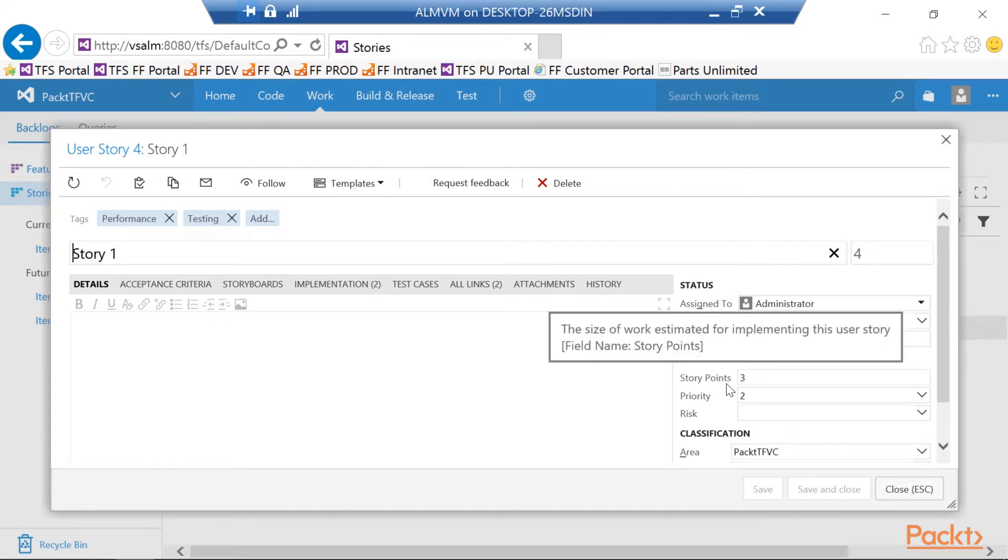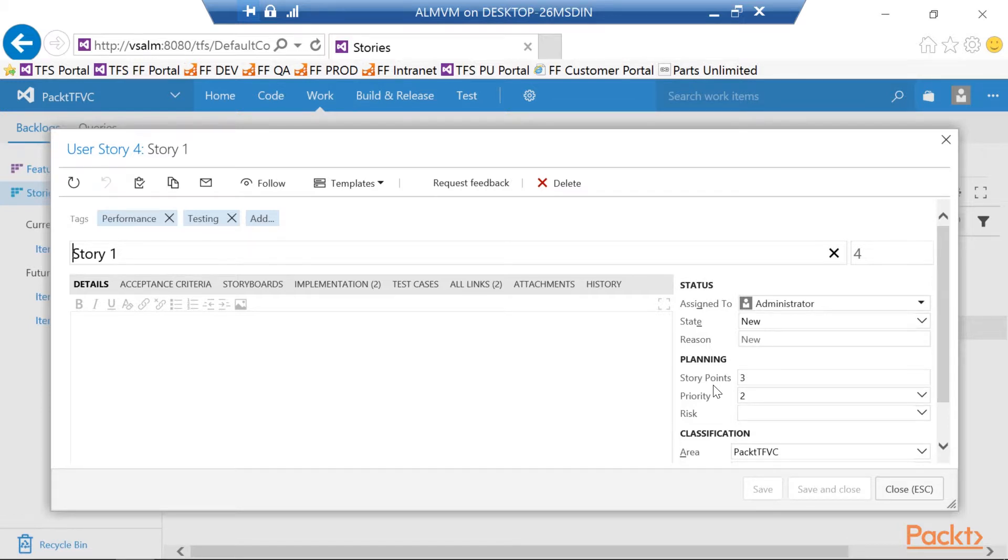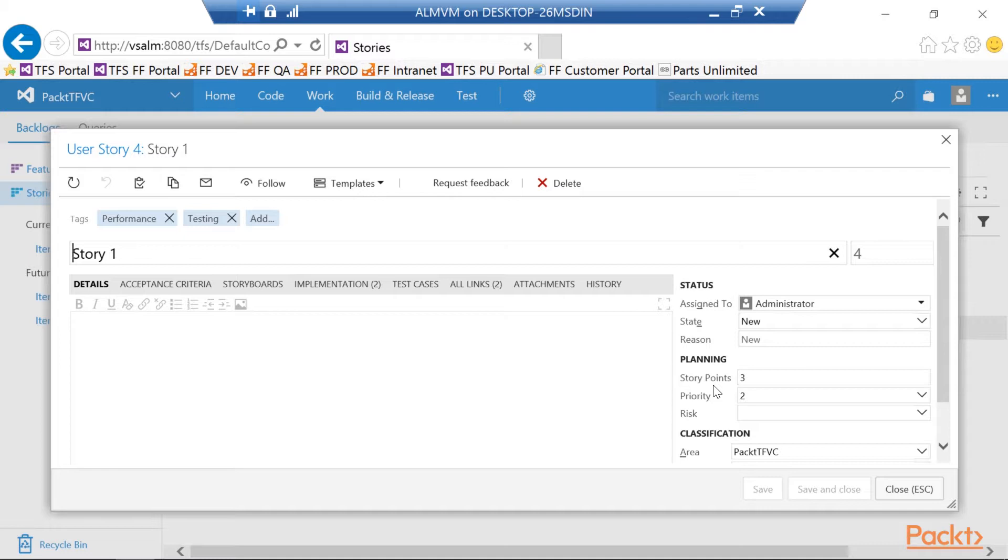Again, story points are an estimated size of how long it's going to take for us to implement this. What's the effort it's going to take? Story points are all about how big is this? How much time is it going to take? So a lot of times, like I stated earlier, companies will actually put hours around their story points. Four hours equal one story point, eight hours equal two, so on and so forth. That's how we set up story points in Agile and TFS.